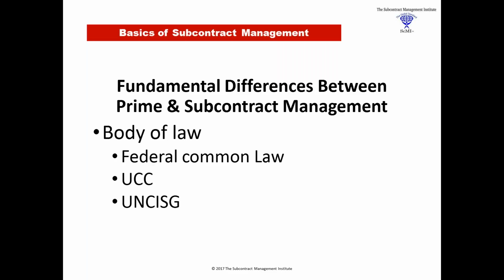And this is one reason why it's so important to understand what body of law you've made applicable to your subcontracts. Some contractors, the major contractors, typically are pretty good about that, and they specify it must be the law of Virginia or California or New York, and they make that very clear. But some contractors have gotten caught because, you see, there's a third body of law out there that can apply. And this is the last bullet there, the UN Convention for the International Sale of Goods.